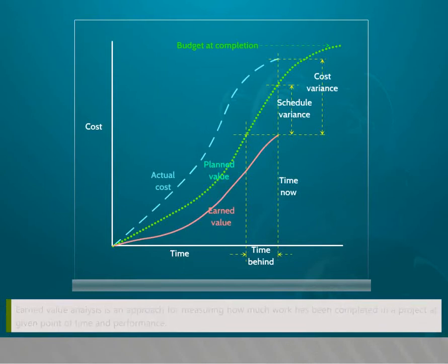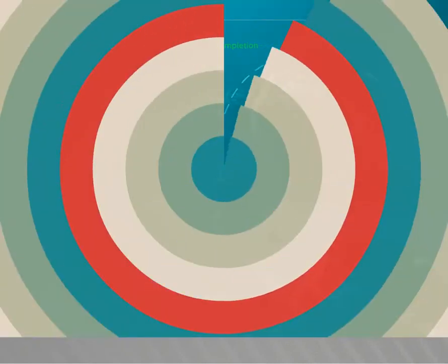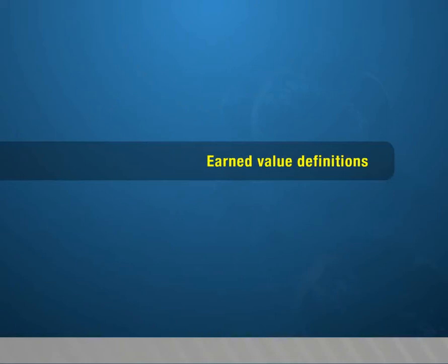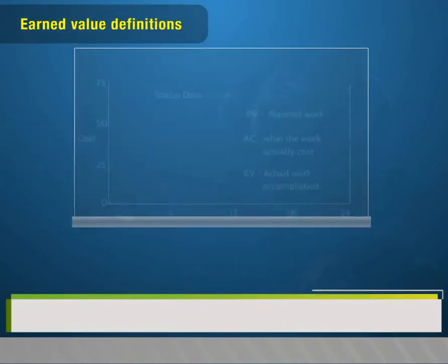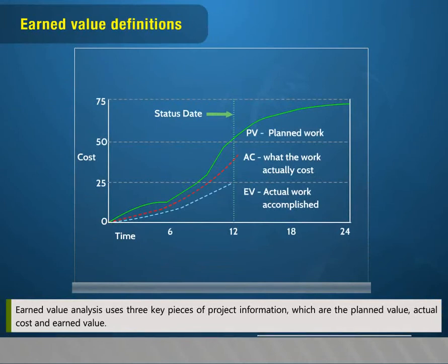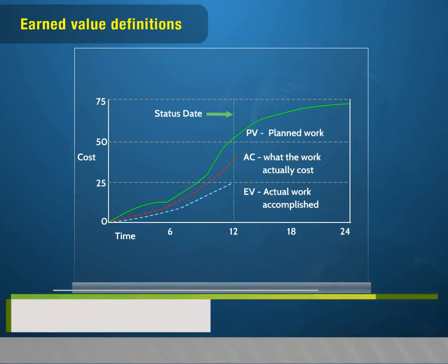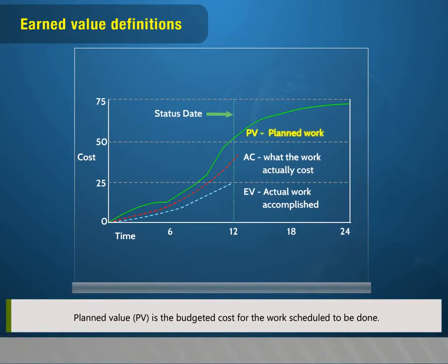Actual information must be entered periodically to use earned value analysis. Was each item of the work breakdown structure (WBS) completed, or approximately how much of the work was completed? Actual start and end dates of the activities or tasks. Actual costs of individual activities and tasks.